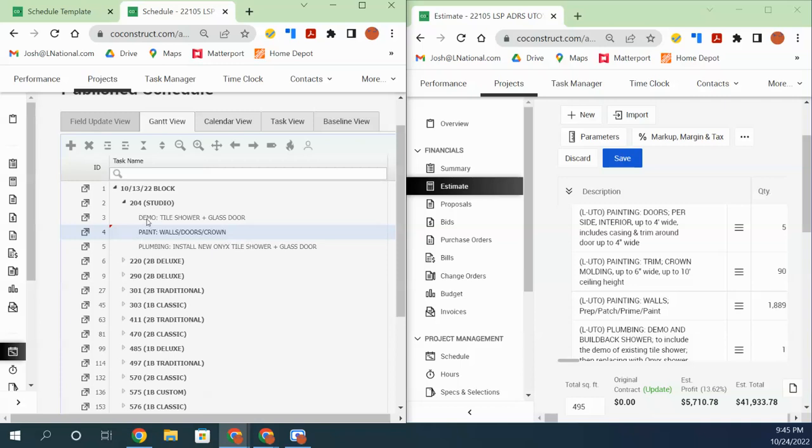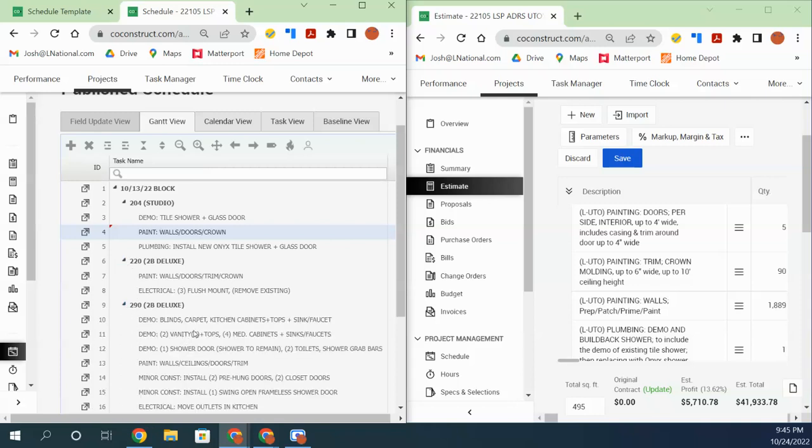Next, take a look at how the line items on this schedule always start with the trade and then colon and then the description. Trade, colon, description. That is very useful in this next step that we're going to review. You typically don't have very many. Once you have a trade put in, it's unusual. It does happen, of course. You're about to see.